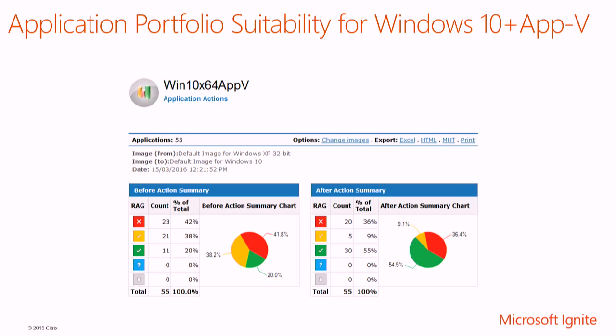And the red ones are, I think, one of the most critical, because normally during a migration project, you'd identify the first business unit and get their applications ready. You'd go, okay, those are ready, they've built the SOE, and we'll roll them out. Then we hit the next business unit and start fixing their apps and getting them ready. And then you hit the third business unit and it's got a problem. It's got a critical app that no longer works. It's 10 years old, it's got some code in it, and that could be a business critical app. It could be a major enterprise app, maybe something like SAP. And all of a sudden you're stopping your project and going back to the bosses and saying, we have to upgrade SAP, it's going to take us 2 years and $5 million. And that normally is a horrible conversation to have at any point of any project.